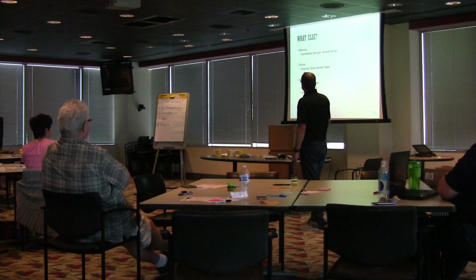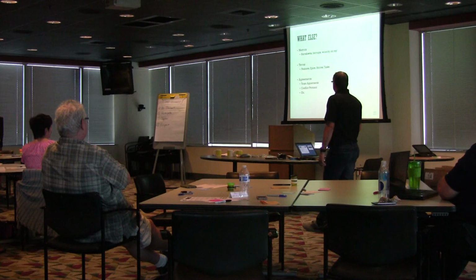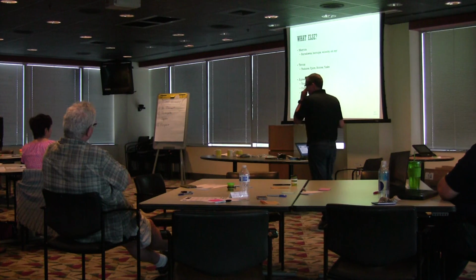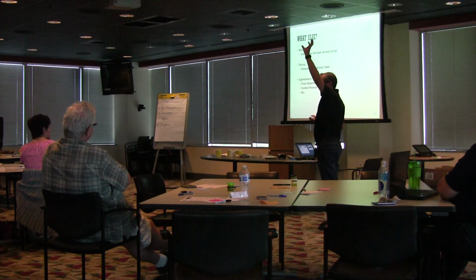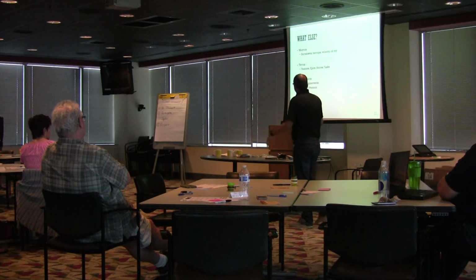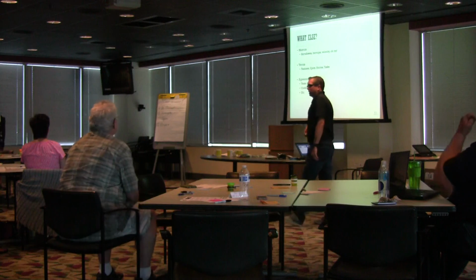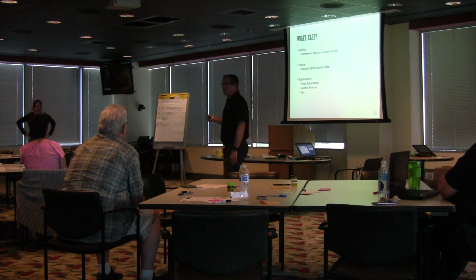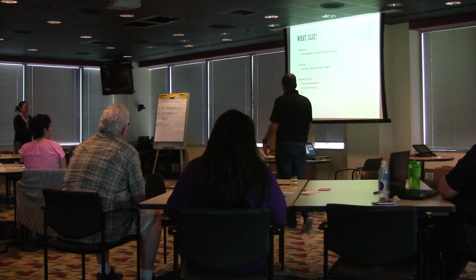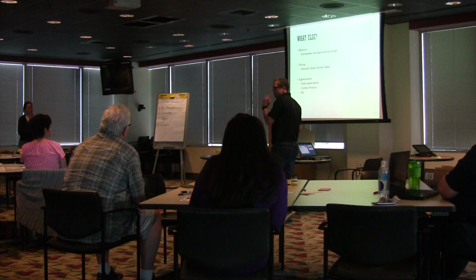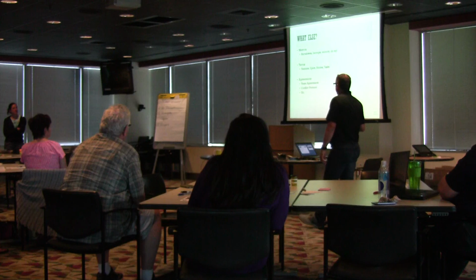Velocity, burn down, burn ups, velocity, oh my. Some other terms you might hear: features, epics. There's a debate. I think Aaron and I debate on this often. What's broader, feature or epic? I don't get too hung up around it, but Aaron does. So I let it win. It's easier. Then we come down to stories. So those stories, and then what are the tasks that make up those stories? So that's kind of a hierarchy. Features and epic, story to task.